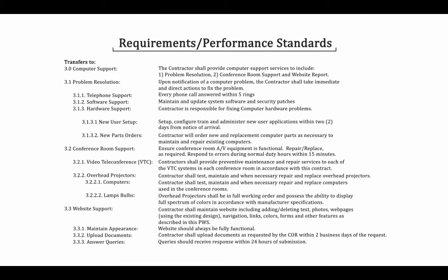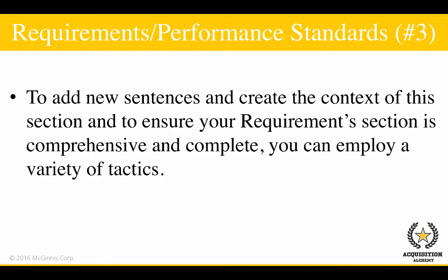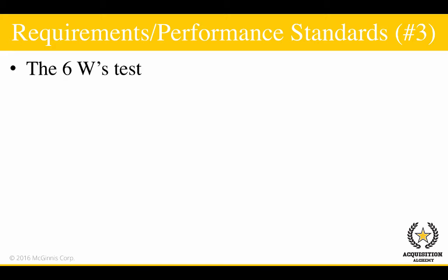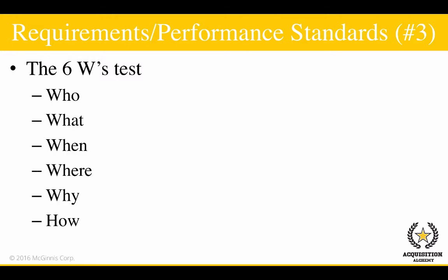From there, you will add sentences and paragraphs which describe your requirement. To add new sentences and create the context of this section and to ensure your requirements section is comprehensive and complete, you can employ a variety of tactics. The most popular tactic is called the 6 W's test. The 6 W's: who, what, when, where, why, and how.